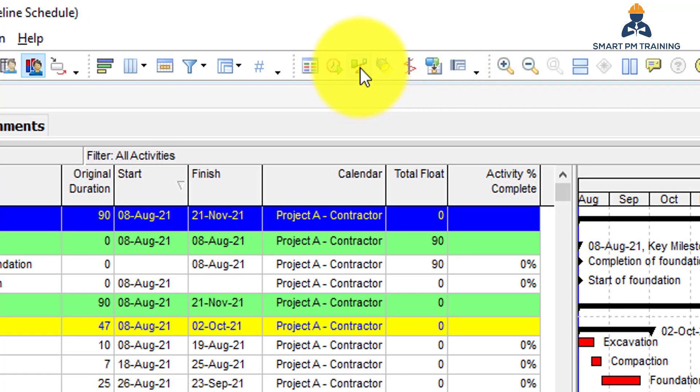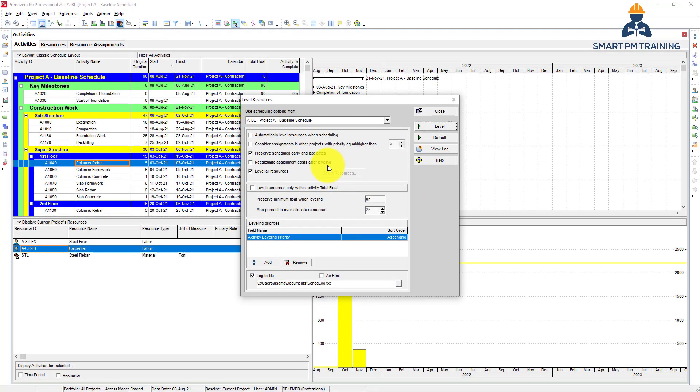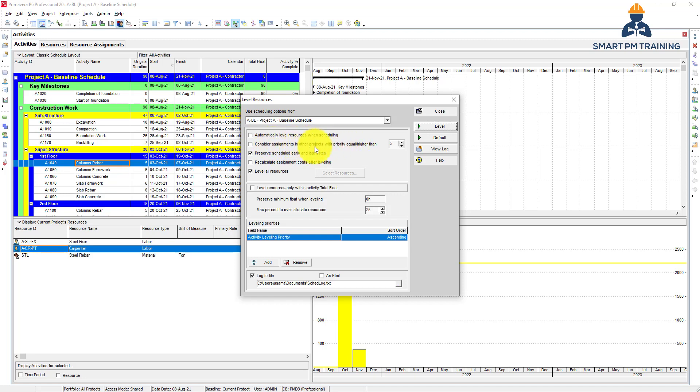To do leveling, go to Resources on the top level. You have some options here. Automatically level resources when scheduling - you uncheck that because you want to level resources when you want to, not every time you schedule. Consider assignments in other projects with priority - this is if you want to level resources among all projects in the company. Many people want a standalone project, but it depends on whether you want to utilize resources among all other projects in your company.